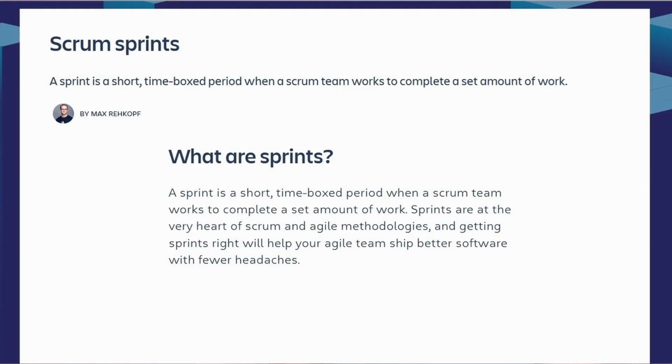With Agile, we will break up work into sprints. And so a sprint could be something like a 2-week chunk of time, give or take. It can be adjusted, but let's just say it's a 2-week chunk of time. Now, in that rhythm, it will begin with a sprint planning meeting where we're planning on what work we're going to accomplish in these next 2 weeks.